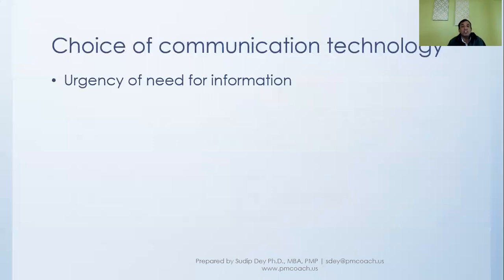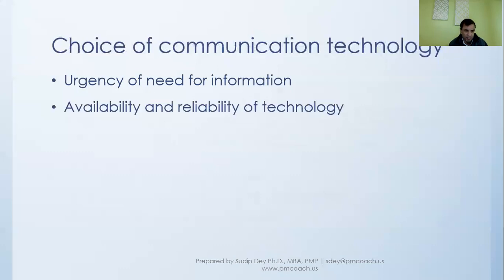For example, urgency of need for communication. If we have an urgency, we don't send an email and just wait for a response. We might either pick the phone or just go and talk face to face. This is how we'll go when there is an urgency of need for information.